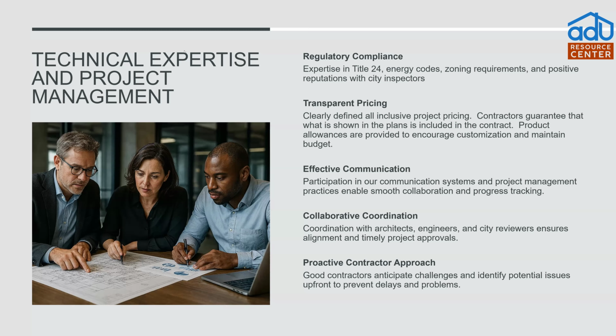If the contract doesn't clearly state allowances for the finished materials, the things that you can touch with your hands, like flooring or cabinets and countertops, oftentimes that's a red flag that they're putting in the cheapest of cheap things. They should definitely have a definition of how much each one of those is allotted for. This also gives you, the consumer, a little bit of flexibility.